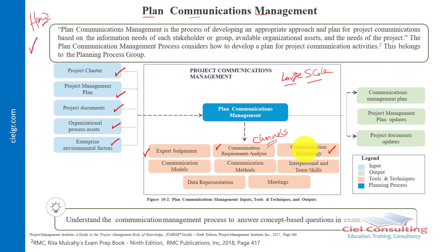Then also your communication technology, because when you're planning your communication, you need to put into consideration which communication technology would be adopted. You don't want a situation where you come up with a communication technology that your team members don't have access to, or they don't know how to use. Then your communication models, which talk about how we encode as well as decode our project information. Then also our communication methods, which include the formal written, the formal verbal, the informal written, as well as the informal verbal communications.